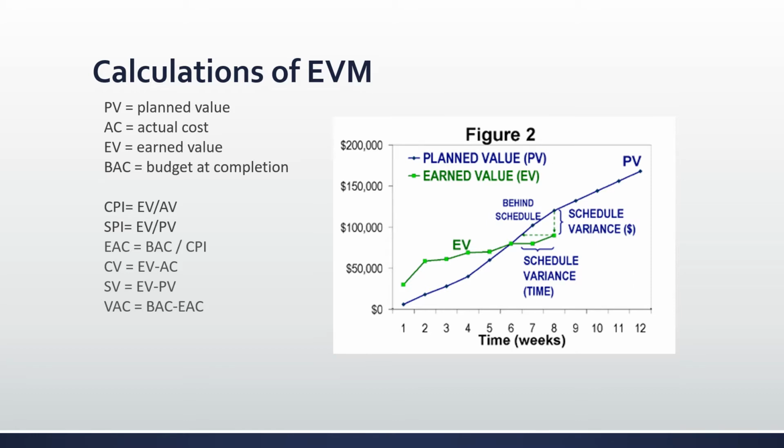And then there's these other figures that you also have to do calculations on, such as BAC, which is budget at completion. That's the total cost of the project. Your budgeted cost for work schedule is also sometimes included, and basically that's the amount expressed in your pounds or hours of work that are performed as per the schedule plan.